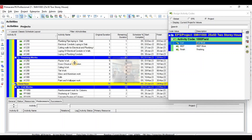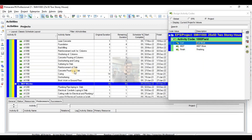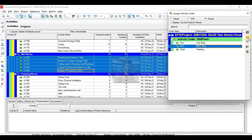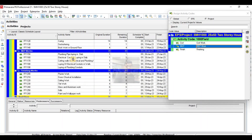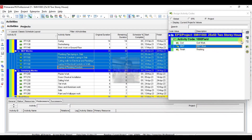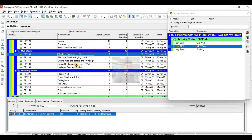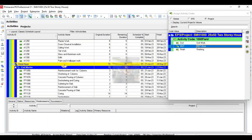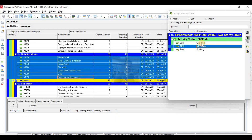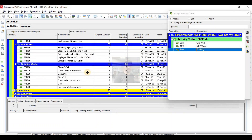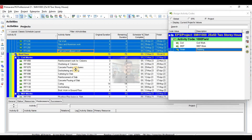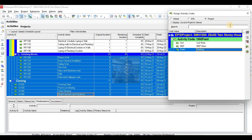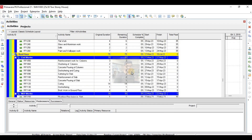Now I will assign the plumbing activity code to plumbing activities. These are plumbing — MEP activities — so I will assign the MEP activity code to these activities. And these are MEP activities. The third one is finishing, so this one is finishing activities — assign finishing activity code. Then finishing activities on the ground floor, finishing activities on the first floor — I will also include these in finishing. So I have assigned activity codes to my schedule.